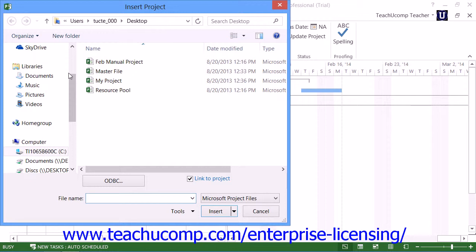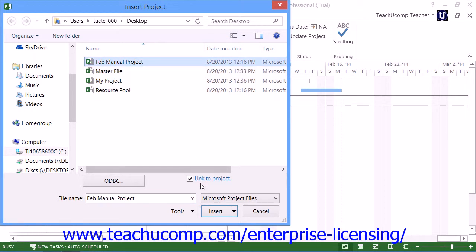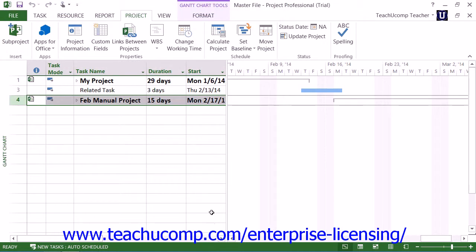Use this dialog box to locate the project file that you want to copy into the master project file. When you see the project you want, click it to select it and then click the insert button to insert the subproject as a linked copy into the main project file.